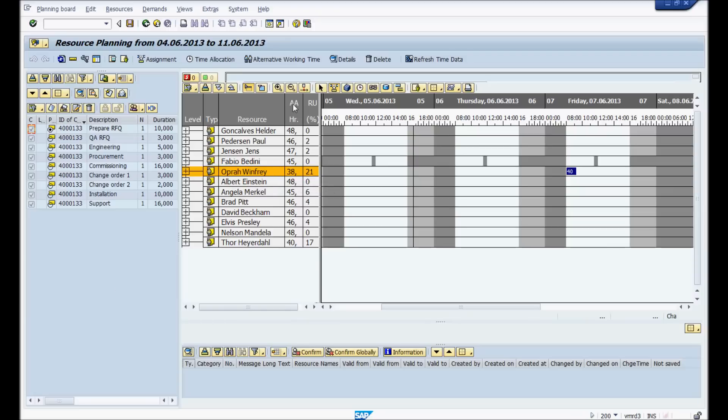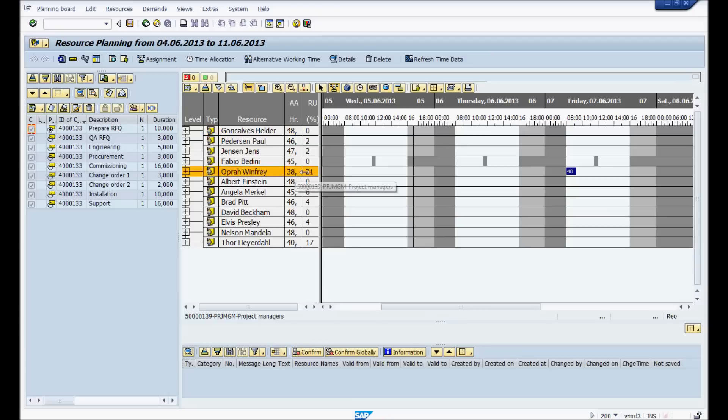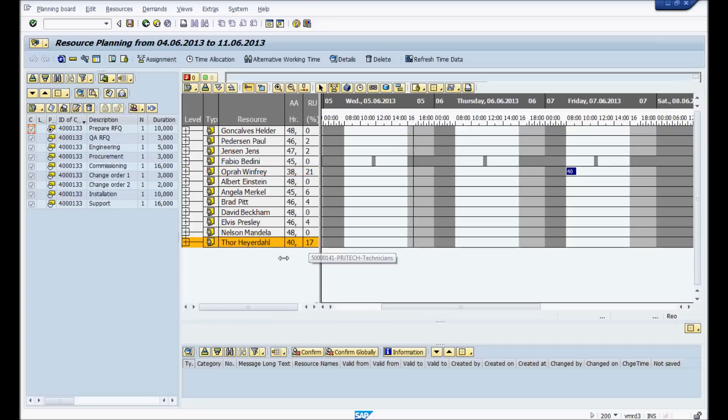Next thing you'll notice is their available hours for the week. They're hard workers, so they're available more than 40 hours a week. And then you see the utilization. Right now, Oprah Winfrey has 21% utilization because 10 hours of her time have been used up. Paul, the same. Thor here has 17% usage.